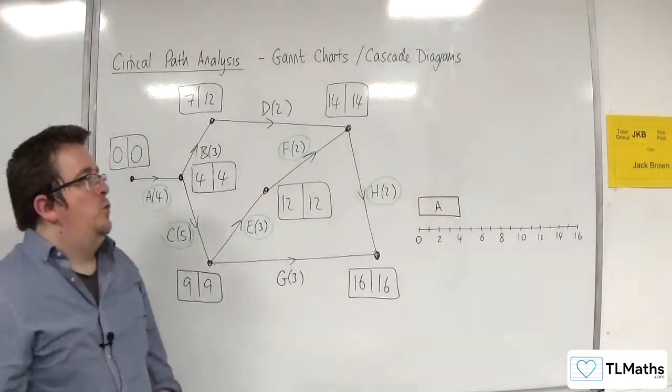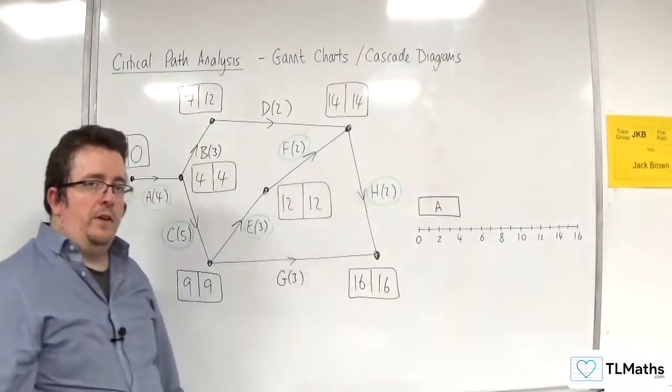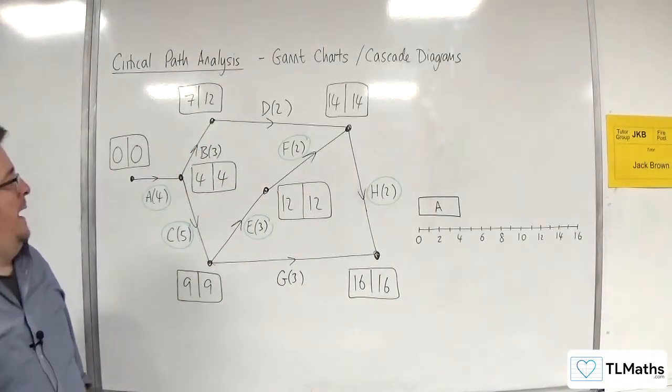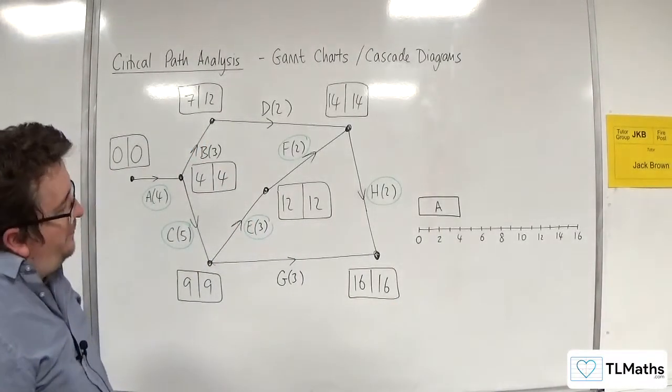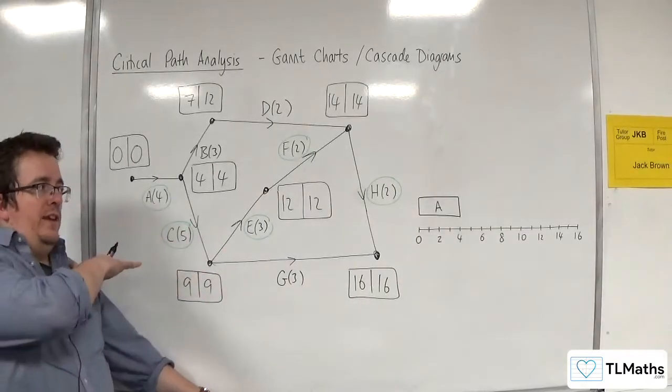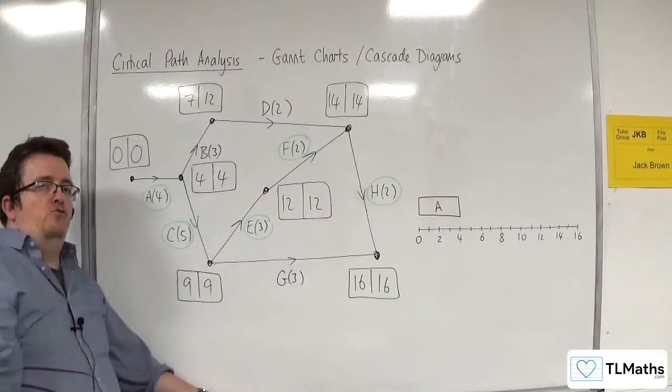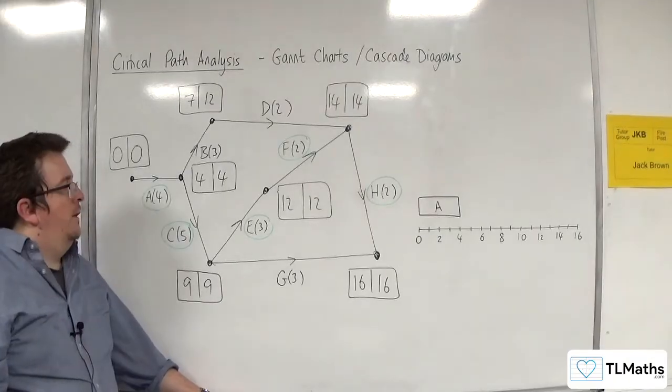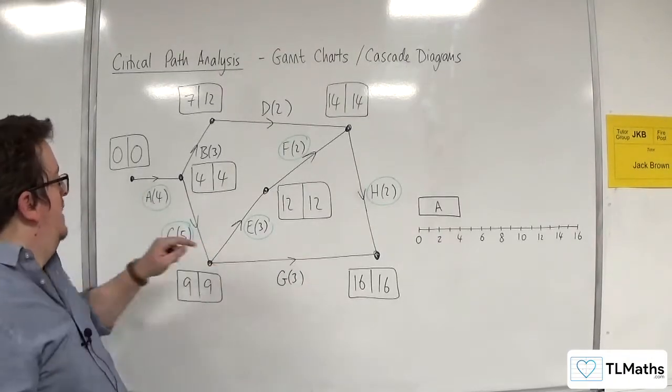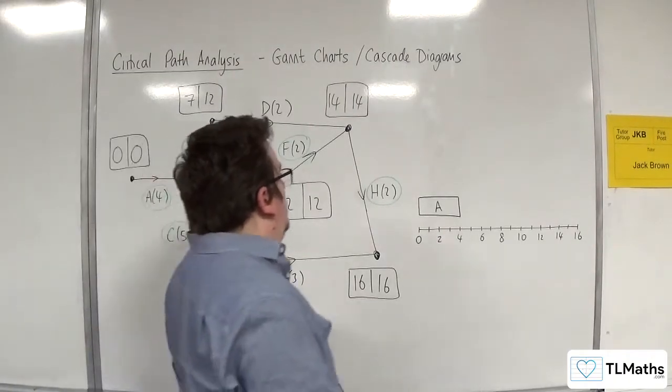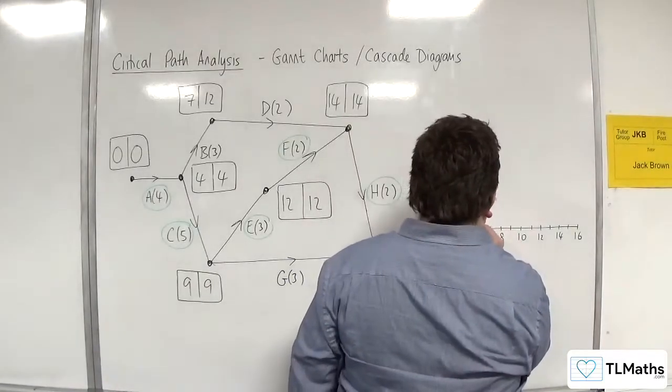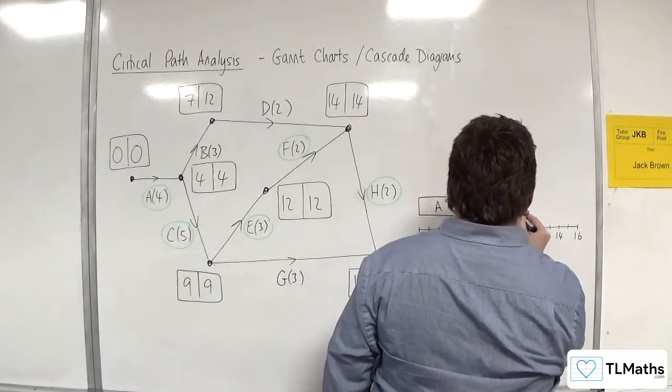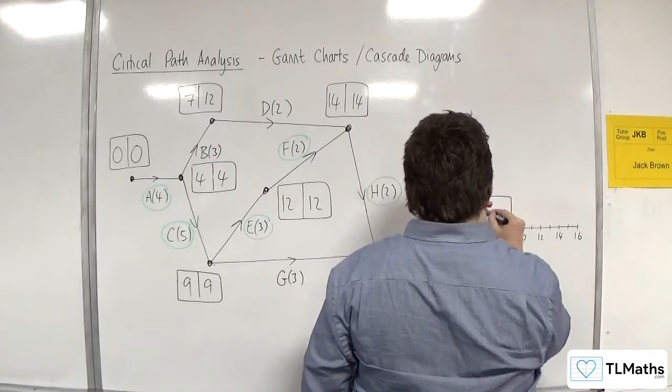So you want it above your time axis with a gap. That's where activity A goes. Now, all of the critical activities go in one single row at the bottom, like I've got here. So I've got A starting, then I've got C which goes between 4 and 9. There's C.